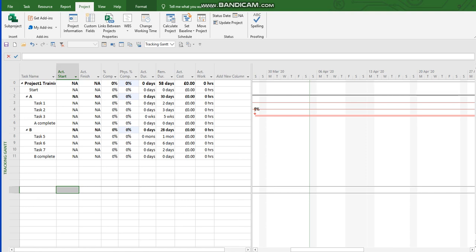In addition to creating activities, assigning durations, adding resources, and building up cost, Microsoft Project can also help you to monitor your progress and calculate your project. So on the view, you would see actual start, actual finish, percentage complete, remaining durations, actual cost. So this is how you report actuals, what's happening exactly on your project, into Microsoft Project. You provide the data and you can calculate your project, if you haven't made any changes, using this command.